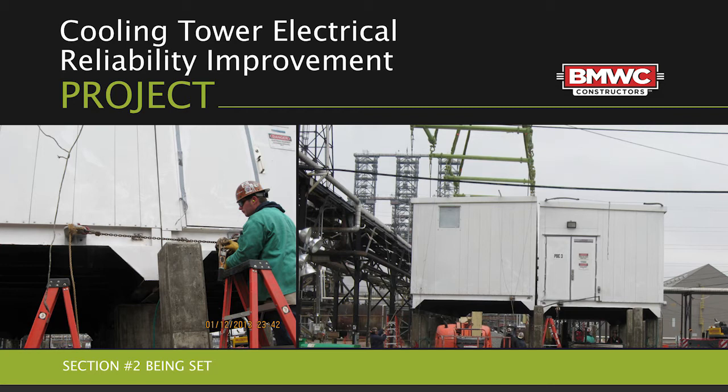Well, the lift itself from trailer to piers was only about 20 minutes per. And that's the success of the planning. Plus, our plan evolved with the input from the field personnel as well. So the equipment itself was delivered a couple days before by lifting gear. It was assembled, and it was ready to be picked as soon as the modules showed up on site.